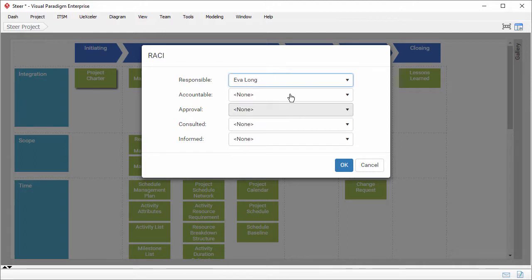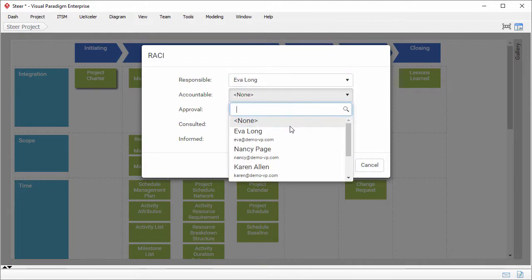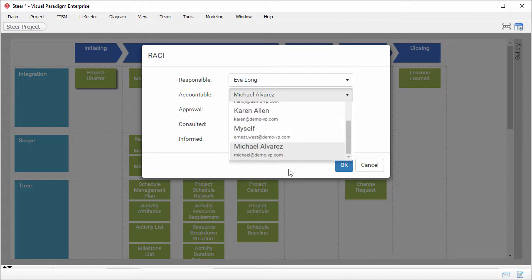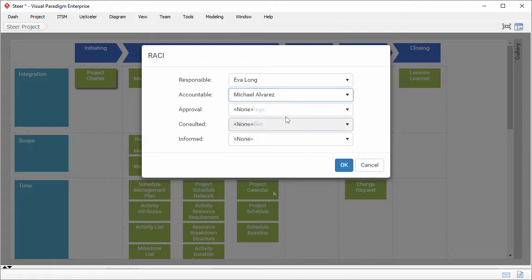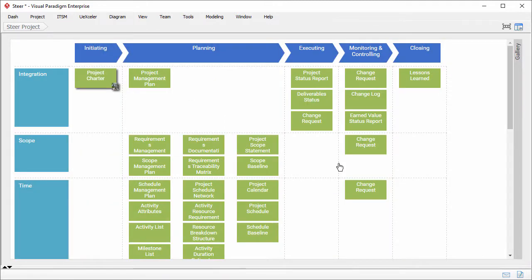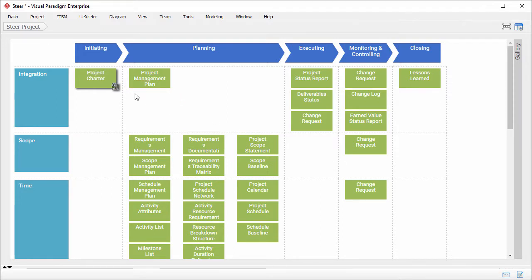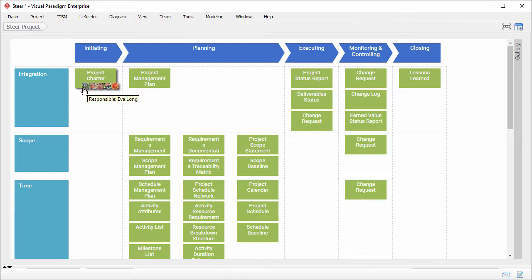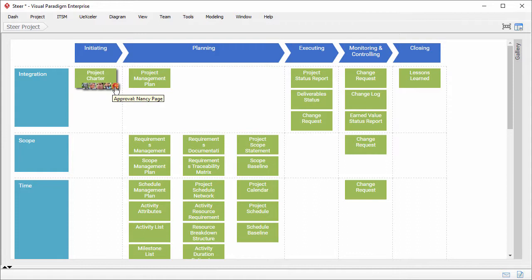If Michael is accountable for this work item, select Michael, and so forth. Confirm. You can see the logo of the responsible member at the bottom right of the work item. When I move the mouse pointer over the logo, the logos of other members are presented.